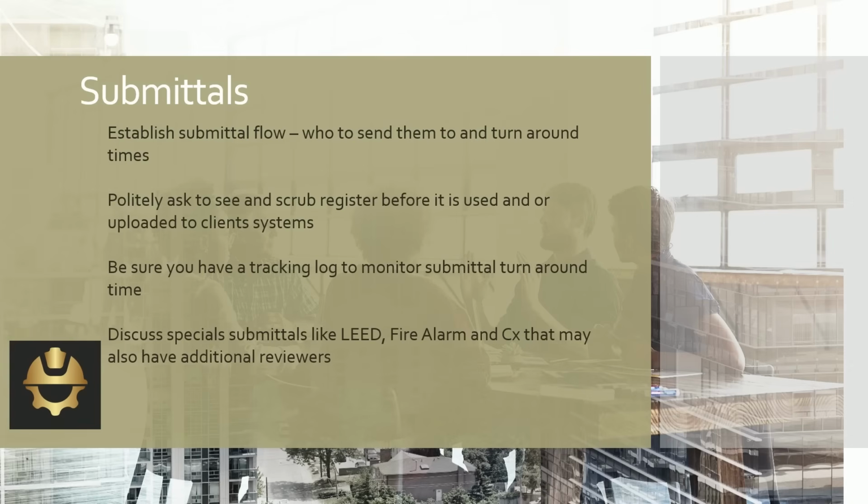Now, the caveat to this is two things. So you've scrubbed it, and the designers say that they don't want to review it, but your client that you're working for may refuse to review the submittal until they see the design firm stamp on there. And that's why it's important to have that discussion with all the partners and stakeholders involved on this project before it's uploaded. So it's very important to get buy-in of all parties. Even though you're the captain of the ship, you still need buy-in.